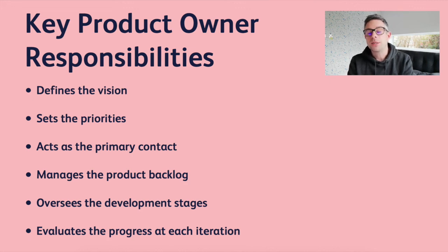So that is that the product owner is accountable for saying, yes, that piece of work is done, that requirement's met, we've addressed all of the acceptance criteria that might be in the user story, and we can now say that that is done. It meets our definition of done and is ready to be released, should it form part of the next release candidate.